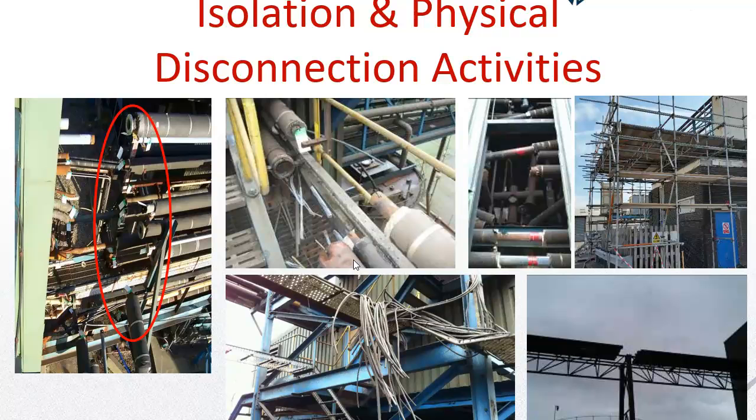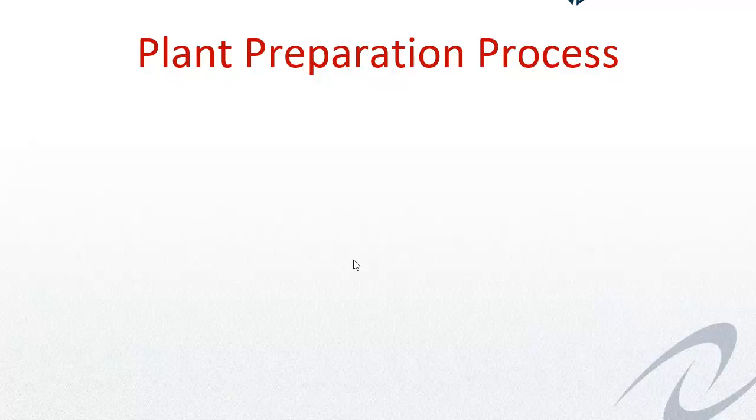source and isolating hundreds or thousands upon thousands of cables, you go to the power source of that particular plant, that particular site, that particular location, and carry out a small number of cable cutting activities, of isolation and disconnection activities, before you then carry out downstream testing of that. But what it would do is minimise the risk associated with the execution of those activities.